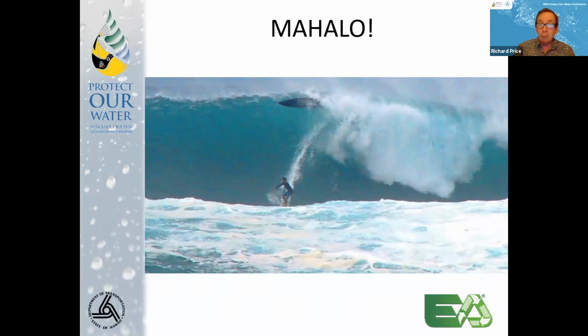As a designer, if I'm not being asked to provide a complete erosion and sediment control plan for the entire site and construction, I would typically provide a note that these are guidance or for recommendation, for use by the contractor, but not as a prescribed design to be followed.